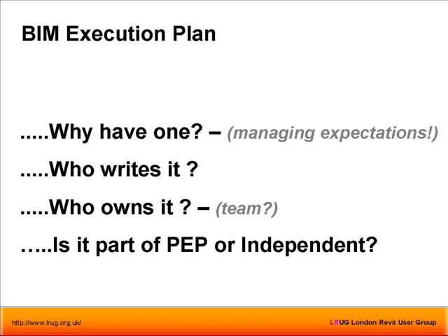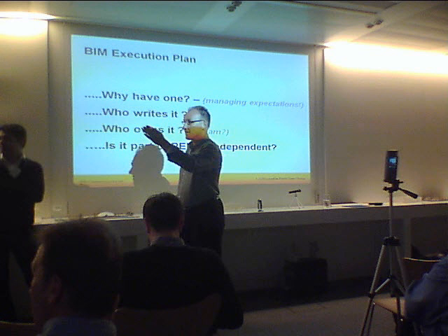To answer your question by picking up what David was saying, the way we deal with this is BIM per se is at no extra cost. Then we'll give you a pick list of extras that you may want from the BIM that does involve extra work for us, and we will charge for it. We'll try and demonstrate the benefits you will get from each of those BIM extras or BIM wins, whatever you want to call them. The client can then say, okay, I'd like that, I don't need that, I would like that. And that is the way we put our proposal together. Just producing a Revit model to make drawings ourselves, which is just modelling, we wouldn't charge any extra for.